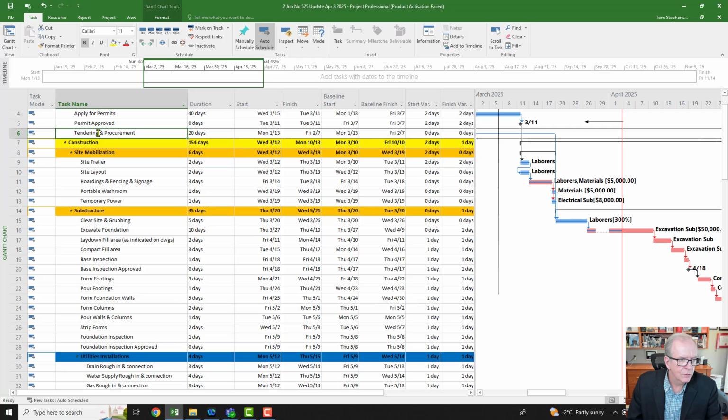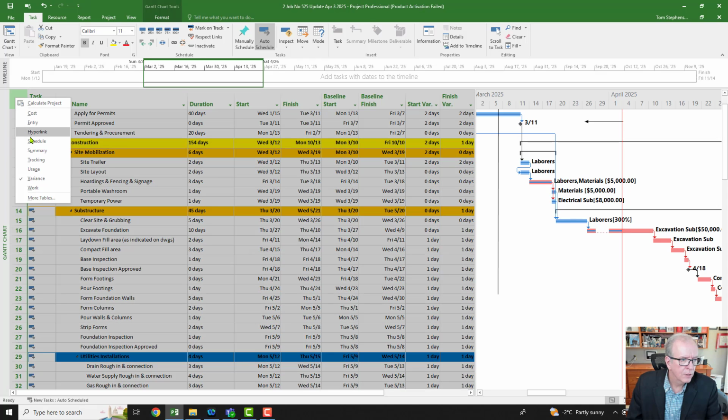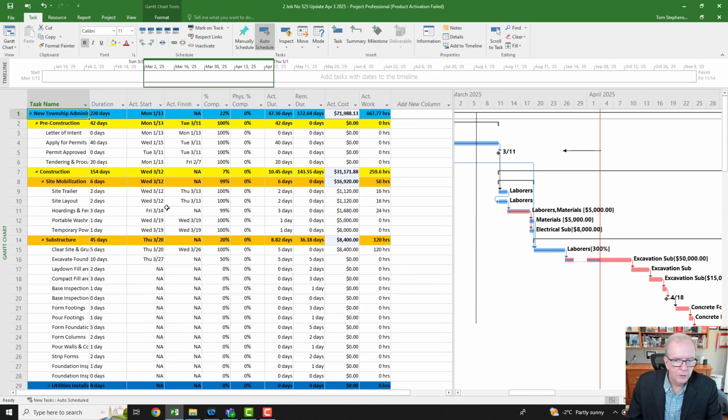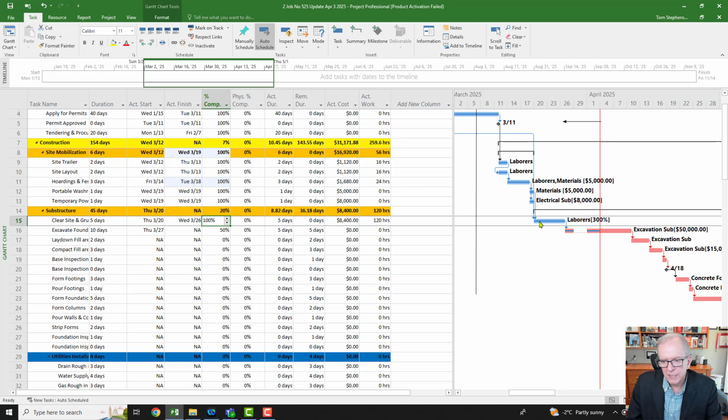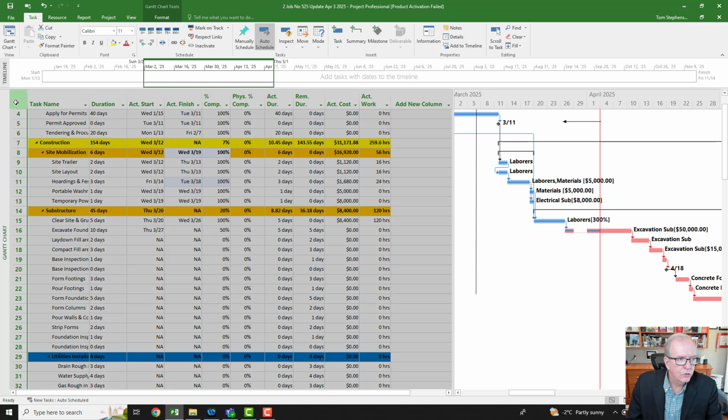So if I actually go to my tracking view, it probably says 99. Yeah, it does that. I don't know why, but I think the newer version online doesn't. So it's now 100%. If you ever see that, you can just adjust that. Okay, so you can see that that is done up to that point. And if I go to my variance screen, everything is now marked on track to the left of the status date.